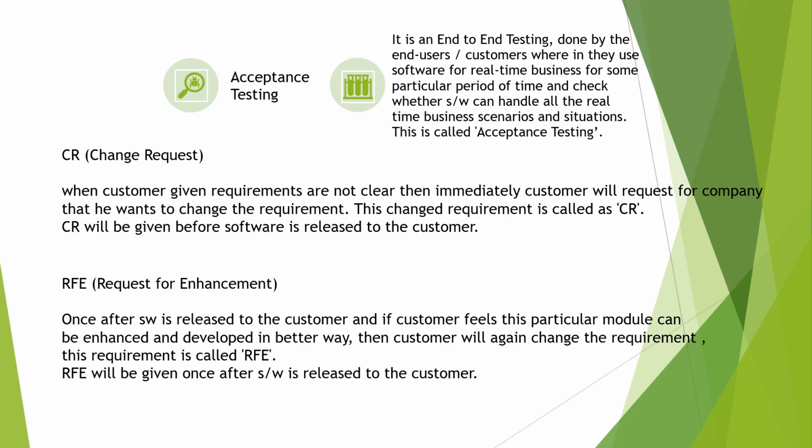While doing acceptance testing, if the customer comes up with new ideas, he will give a request for enhancements. Enhancement means changing of the requirement before releasing the software only. I mean, while the test engineer is testing or the developer is developing, at that time the customer comes up with some requirements. If you want to add that, we will call it a CR, change request. So before the software is released, any requirement changes are a CR.